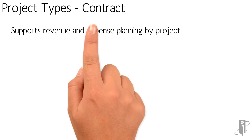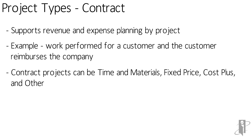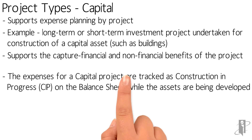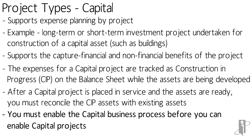We have contract projects. These are generally something where you're doing work for a customer, and the customer will be reimbursing you, maybe based on time and materials. It could be a fixed price, or your incurred cost plus some amount on top of that. And then you have capitalized projects. These are where you're creating an asset such as a building, a new data center, or a complex software implementation you're going to need to capitalize. It will track both the financial and the non-financial aspects, and this framework on the cloud even lets you do things such as work in progress, construction in progress.